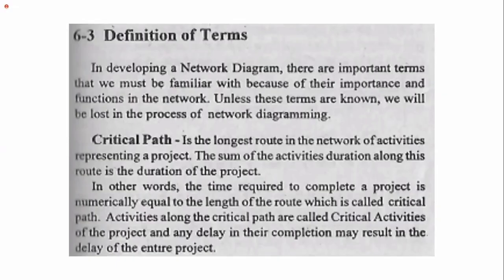So, important terms: critical path. As in our last discussion, it is the longest route in the network of activities representing a project. The sum of the activity durations along this route is the duration of the project. So critical path is just the longest path.